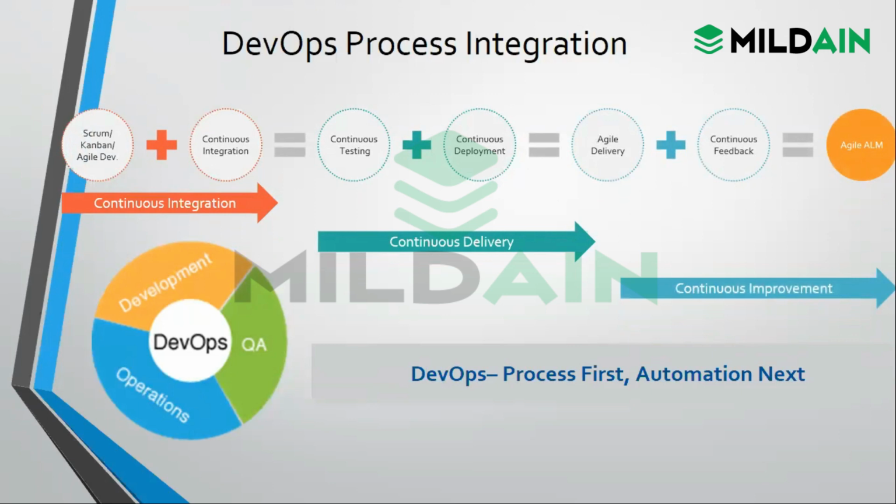So what is happening? We are having agile mode. In agile mode, we are having short sprints, 2-week sprints, and after completion of a sprint, there is a complete analysis of the sprint in one meeting, and we take feedback from there and then continue.